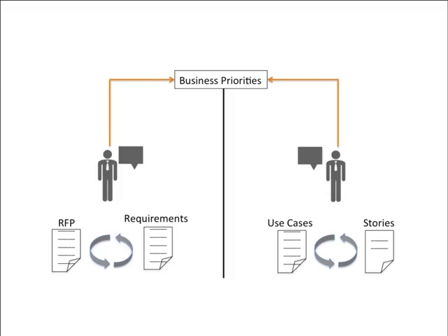So if we look at this from a different perspective, had we had business priorities, a lot of things would have been solved. One of the stories that I like to tell is that on the development side of things, the development team raised the red flag that there was no way they were going to be able to deliver what they were being asked to deliver in the time they were being asked to deliver it. And so the product team said, well, why don't you guys go spend a day and figure out what it is you think you can deliver? Well, the dev team did that. They went off site and spent the day looking through all of the use cases and determining what they felt they could implement. But when they came back and presented what they thought they could implement within the time frame, they had completely missed the business priorities and the importance of certain elements.